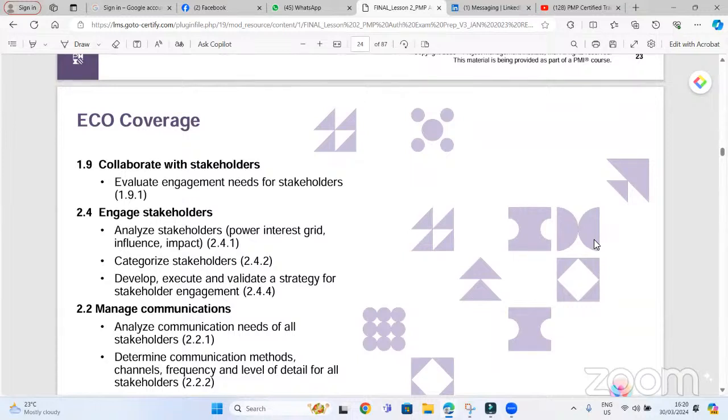Then once we identify them, we'll create a stakeholder register. Now, this is an important document. The PMI methodology guides us that we need to come up with a stakeholder register, in which we will register a stakeholder with all the details, such as the department. And then we talked about assessing the stakeholders in a bit more detail. Like, we want to identify the power level, where this stakeholder sits in the organizational hierarchy. So we need to identify the power, interest, and influence level of the stakeholders.